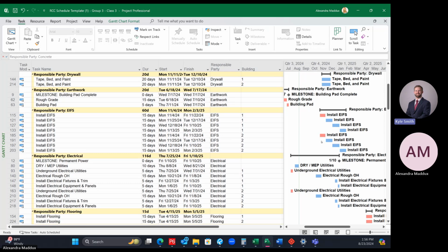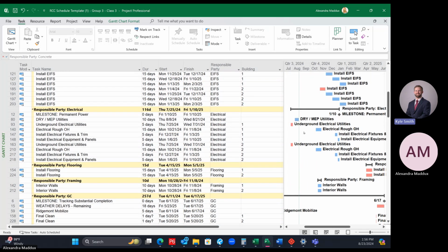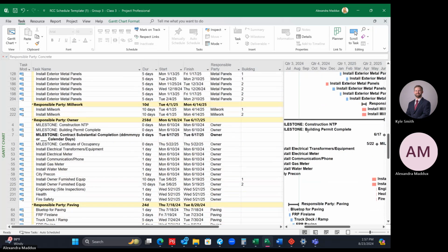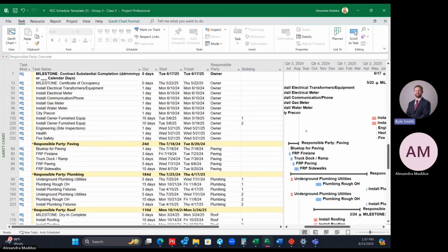This is where you would go through and determine if you add crew ties to it, or if you do have multiple crews, or whatever you need to do with that information. But this is how you could double check how many people you have in 2 places at once. Does that make sense? Okay, perfect.